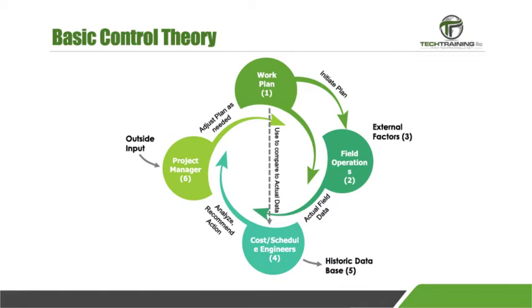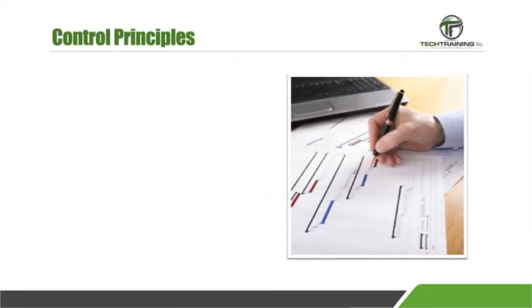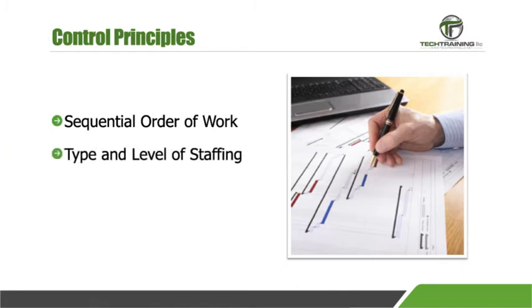The first step is the project plan. This initiates field operations. A project's budget, schedule, and general building strategy must be continually reviewed and revised as necessary. The project plan should state the sequential order of work, the type and level of staffing, and the equipment needed.